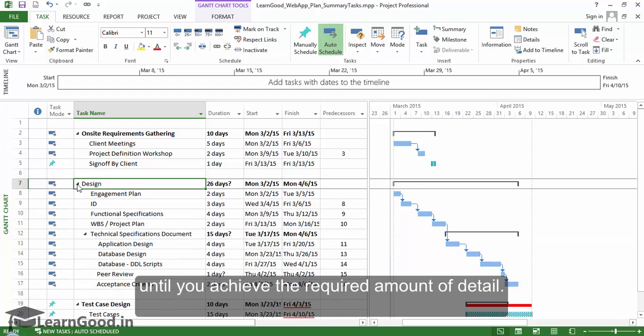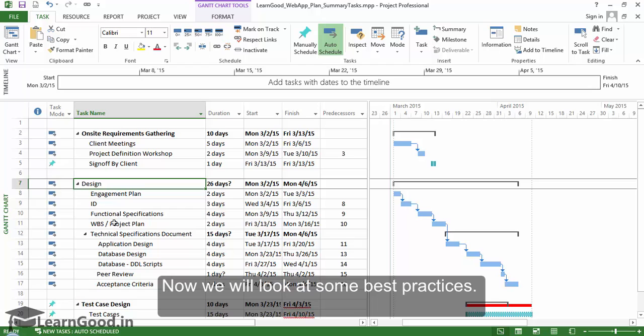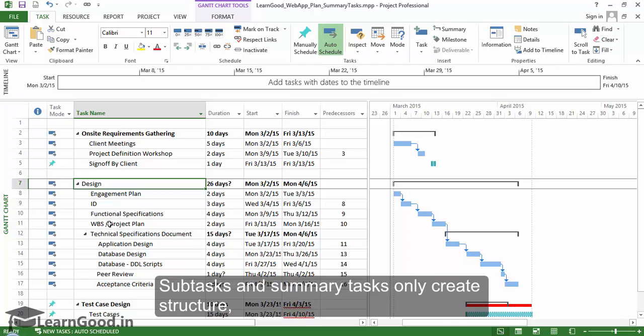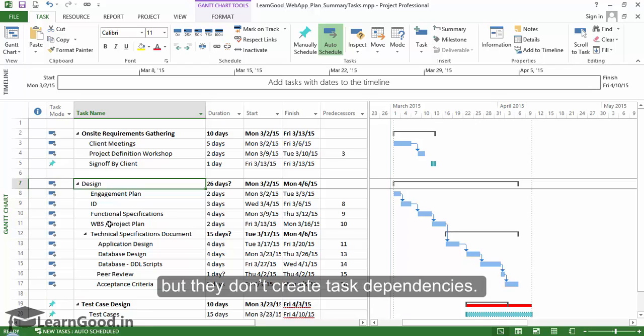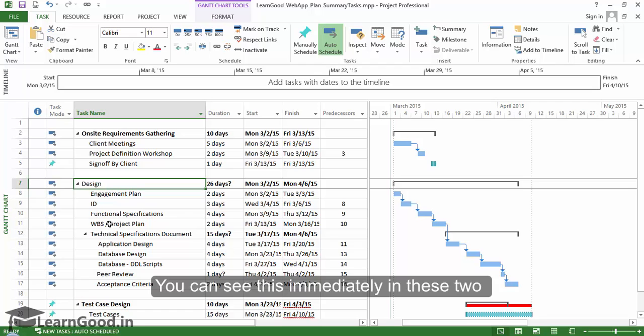Now before we end, we will look at some best practices. Subtasks and summary tasks only create structure but they don't create task dependencies.